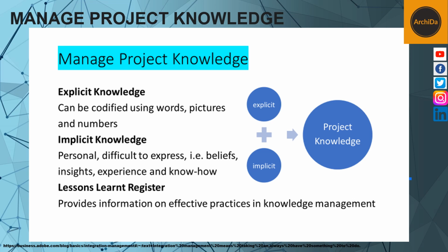Discern the difference between tacit and explicit knowledge and record as much of both as you can. This way, workers don't need the benefit of psychic powers to grab it from a colleague if they have any questions. So what is tacit knowledge? Tacit knowledge is the knowledge workers retain without context, that is, without knowing how they know, while explicit knowledge is the knowledge workers have that can be asked for and formally recorded.